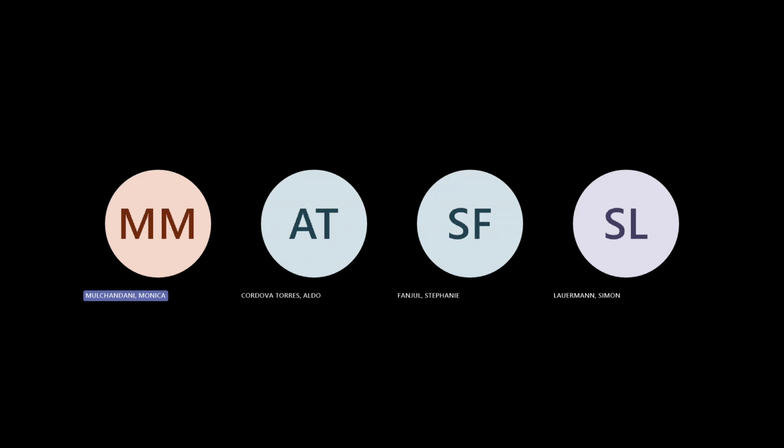That is the simplest form of a project, where it doesn't go through many phases or have a major workflow to it. But for example, the other one I'll briefly describe is normal CIP, which is the most elaborate workflow of a project, which goes through each and every phase defined for a project. All others are subsets of it, where they go through a subset of the activities that a normal CIP project goes through.